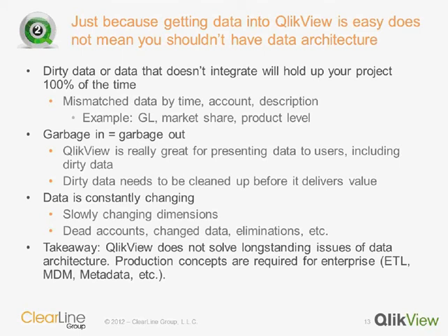Just to give you an example, I was working with a pharmaceutical company. They wanted to integrate their GL data with market share data, and also some data related to production of particular pharmaceutical products. And the data didn't integrate because it was all reflective of a different time period. The bulk of the project was spent doing the things that needed to happen to integrate that data so that it would all reflect the same viewpoint of different processes happening within that manufacturer.